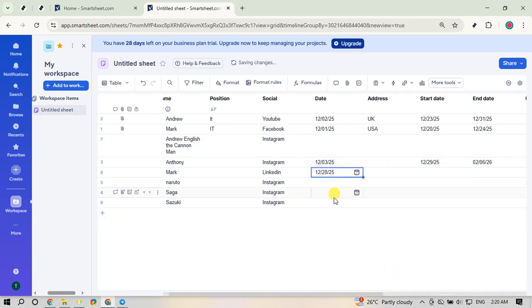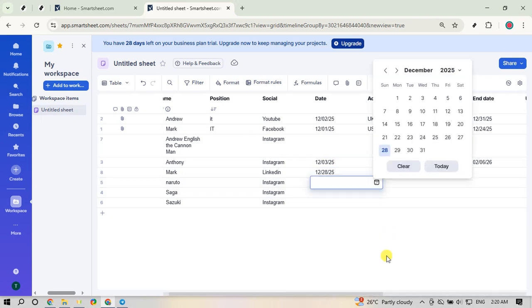If you want the same number of days added across multiple rows, use the fill handle to copy that formula down the column. If your rows require different day counts, edit the number in each row's formula. If you already track a day count in another column, you can reference it instead, like your date cell plus days cell. So each row calculates automatically from your data.